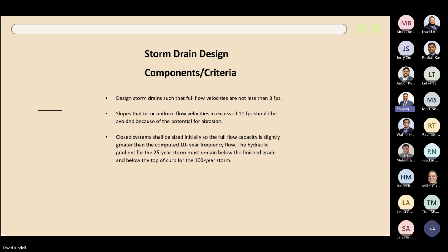Well, I can give some information on this one. Ankur, if you remember correctly, they did the video inspection on US 13 business over Waikamico. They provided us the video inspection files, so that effort was not much. If you know which pipes need to be video inspected, you can just calculate the linear footage. In our US 13 case, I think it was like $4,000 or $5,000.